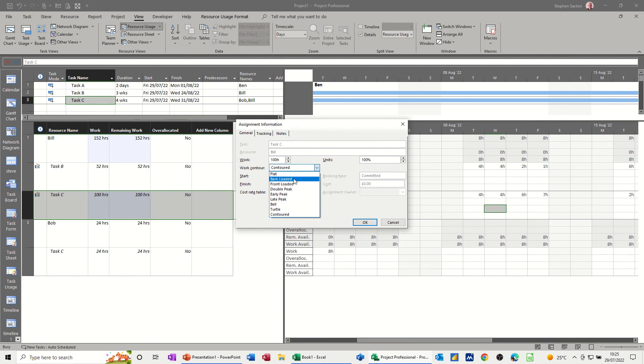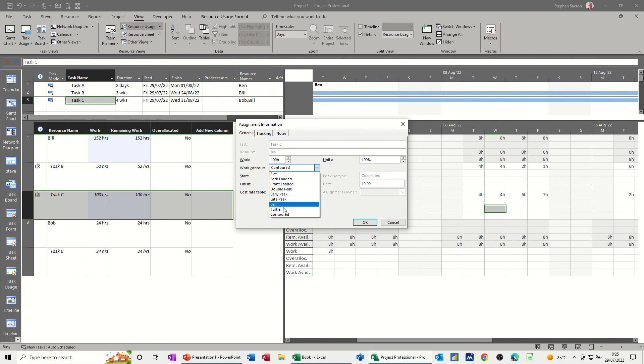Backloaded. Most work goes on at the end of the project. Frontloaded. Vice versa. Two peaks. Maybe beginning and end. And all these different options are known project management contours.